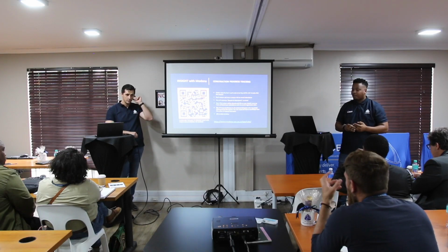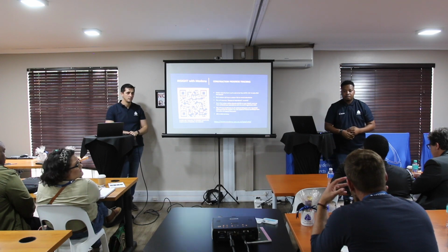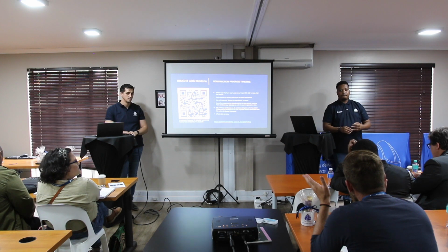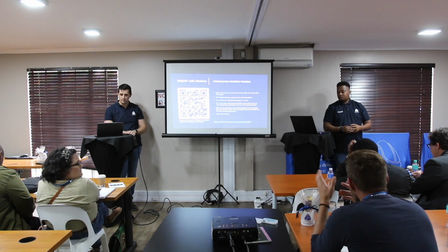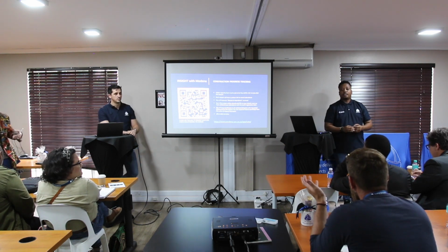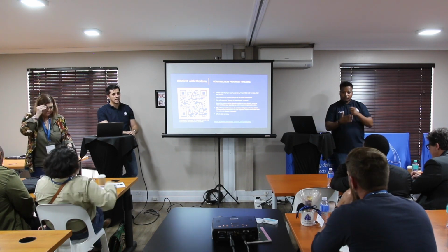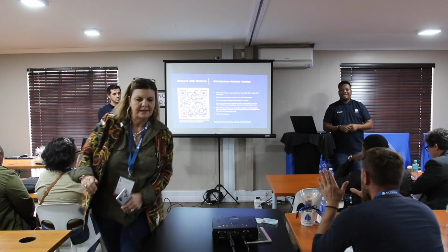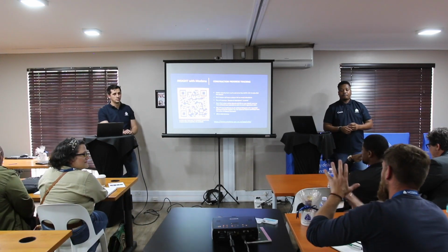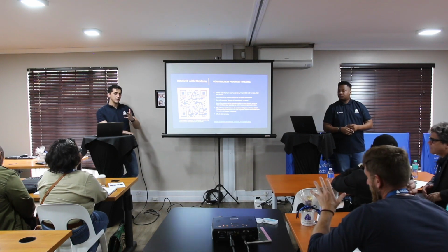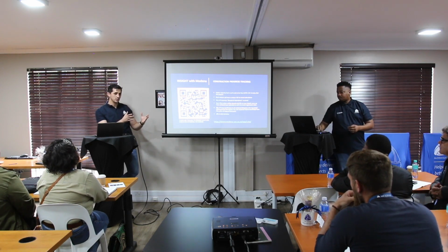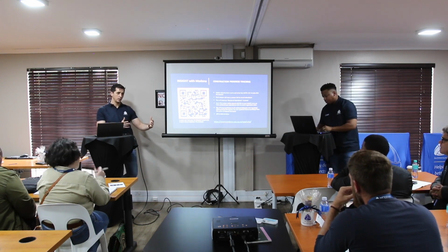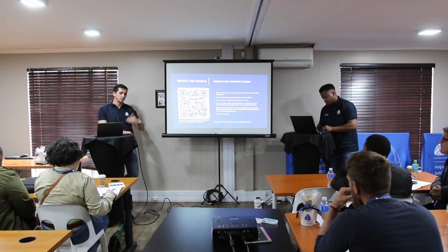You can extract an asset list from the build, can't you? Yes, you can. And then you can set a rule that nothing gets placed on site without that barcode. So as it arrives, everything gets scanned and put on the system. And then as it's building on site, you can compare it. So that's where your BIM execution plan is so important, because that will talk to how assets are managed once delivered and when they need to be installed. We'll follow that BIM execution plan.